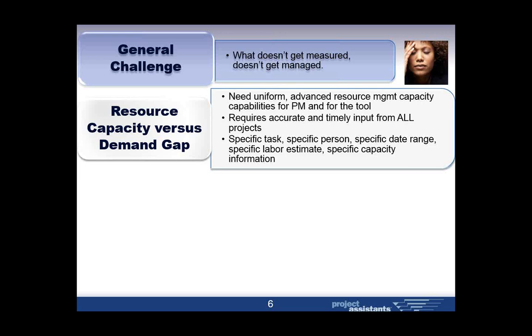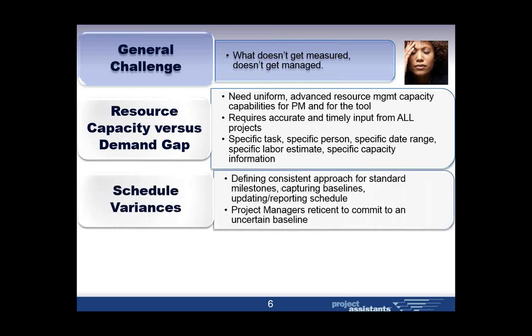And the real challenge gets down into when you look at, for example, how I know what demand is, it's that specific resource within that specific time frame with that specific labor allocation to that specific project, to that specific intermediate deliverable. That can be daunting to keep up to date on a regular basis. So we find that this resource capacity versus demand gap identification is one of the greatest challenges in using tools like this.